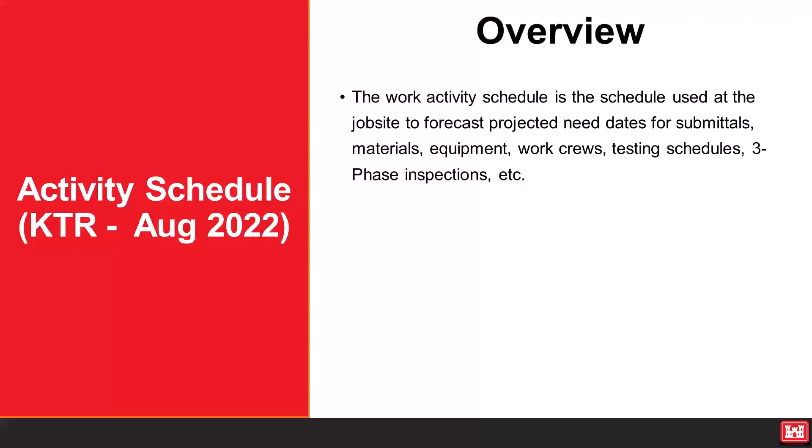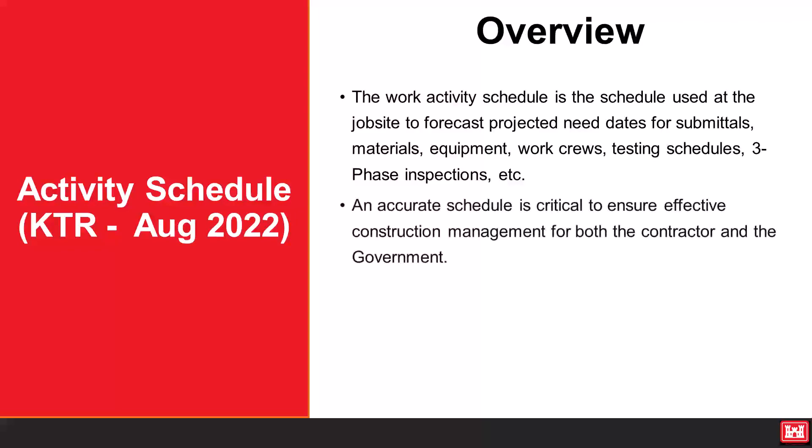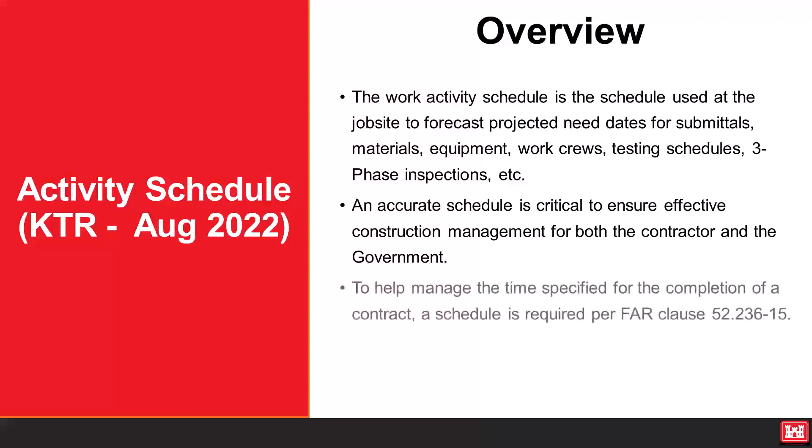An accurate schedule is critical to ensure effective construction management for both the contractor and the government. To help manage the time specified for the completion of a contract, a schedule is required per FAR Clause 52.236-15.